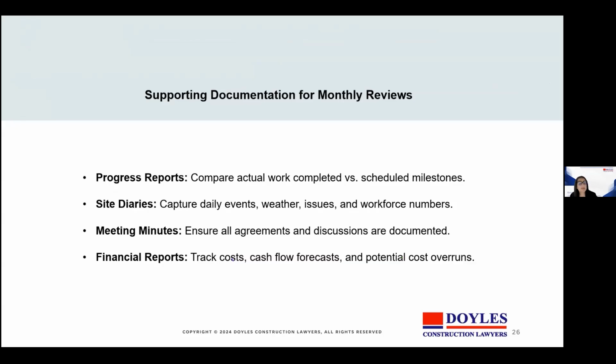Here are some examples. They could be progress reports that compare actual work versus the scheduled milestones, site diaries, which capture the daily events, meeting minutes to ensure all agreements and discussions between the relevant parties are documented, and financial reports that track costs, cash flow forecasts, and potential cost overruns. So these documents become evidence. Consistent, contemporaneous records carry real weight in disputes.